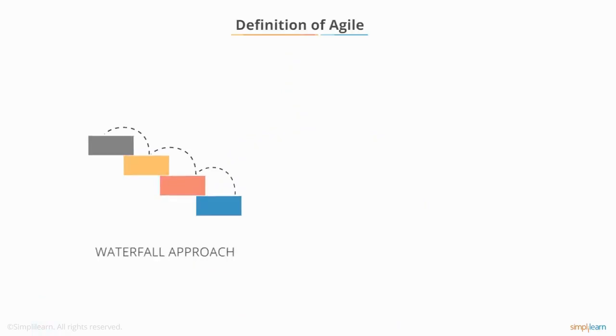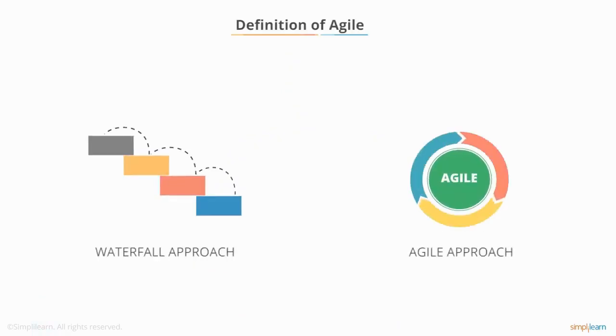There are two main approaches to managing projects: the waterfall approach and the Agile approach. The waterfall approach involves big planning upfront in order to determine the detailed scope of the project and establish the project's performance baselines. Once executing begins, actual results are compared to the baselines in order to determine the health of the project.